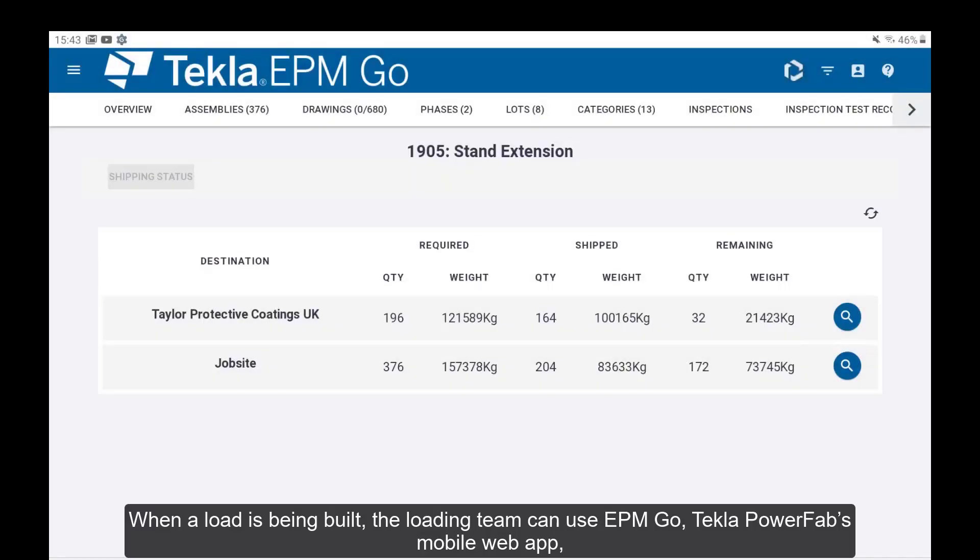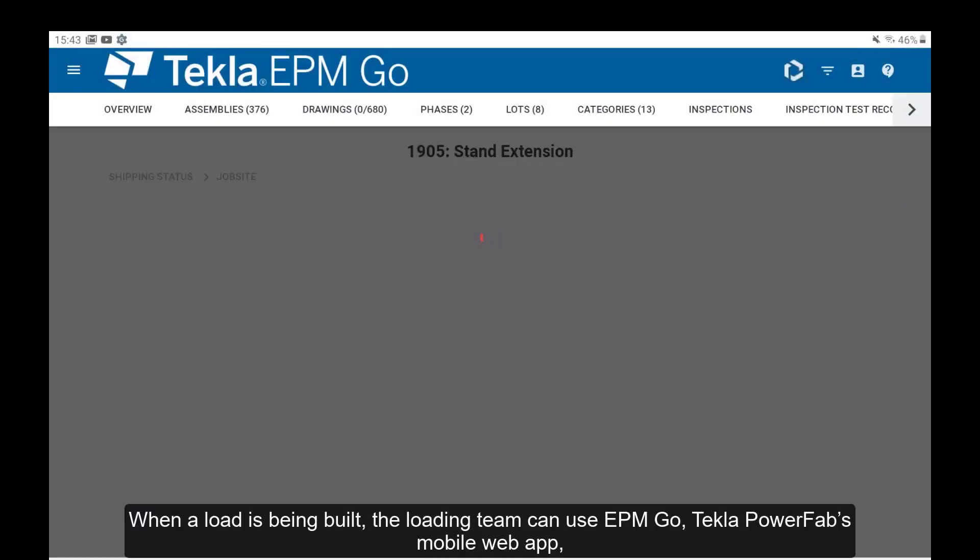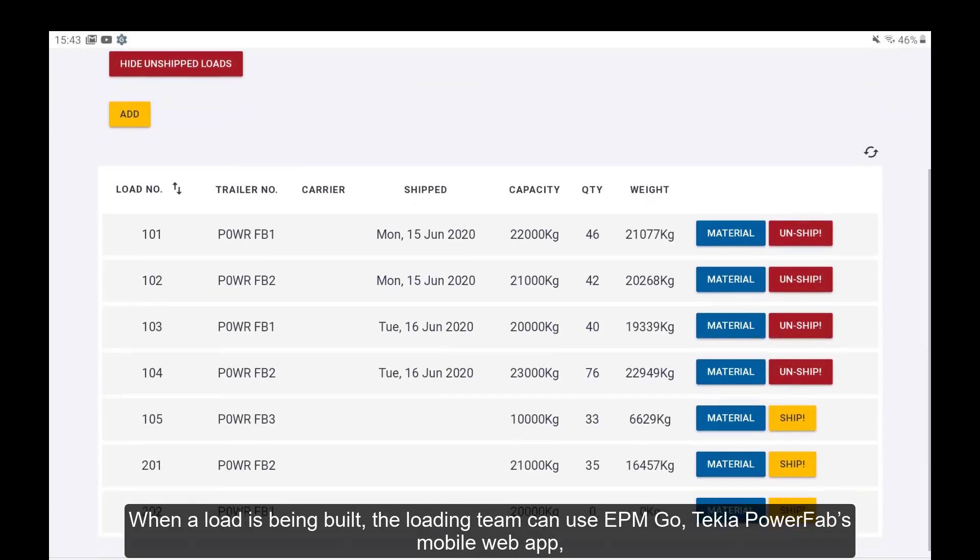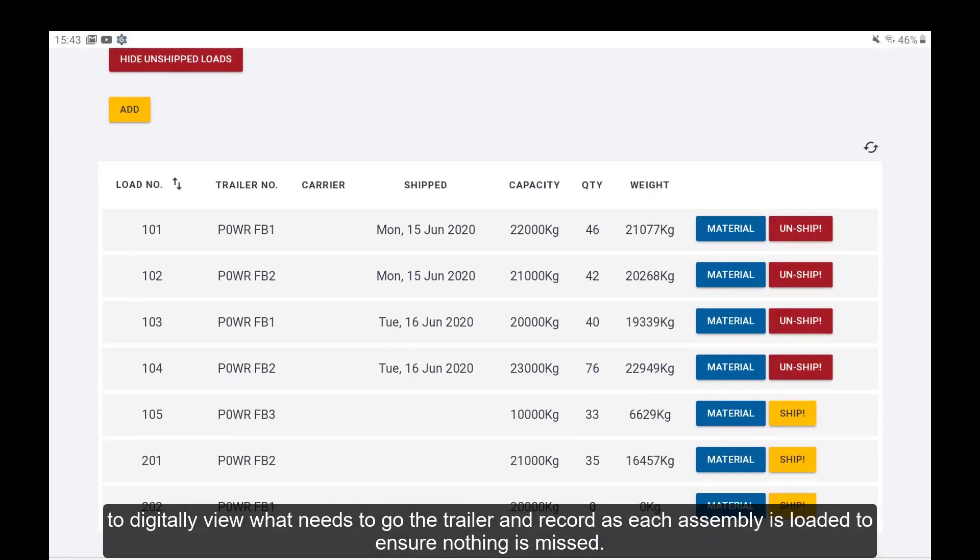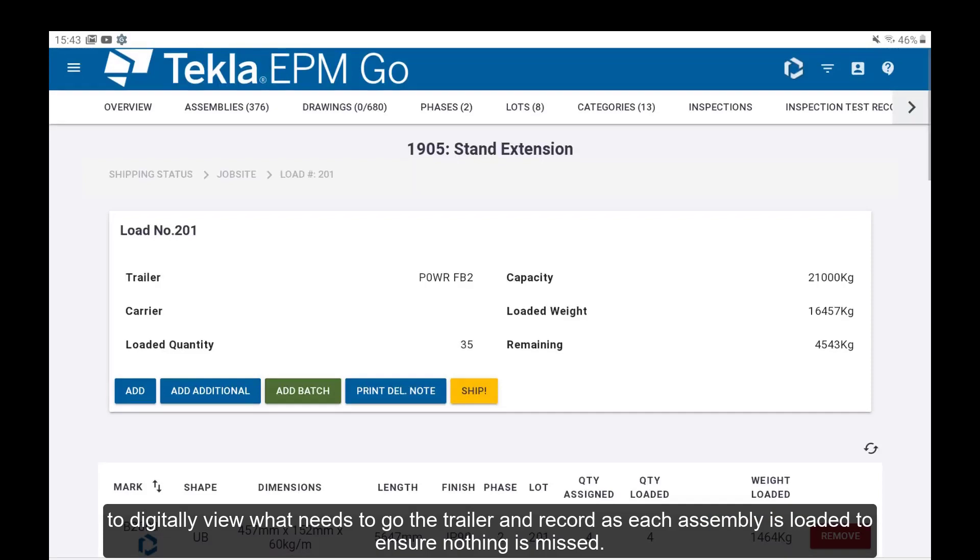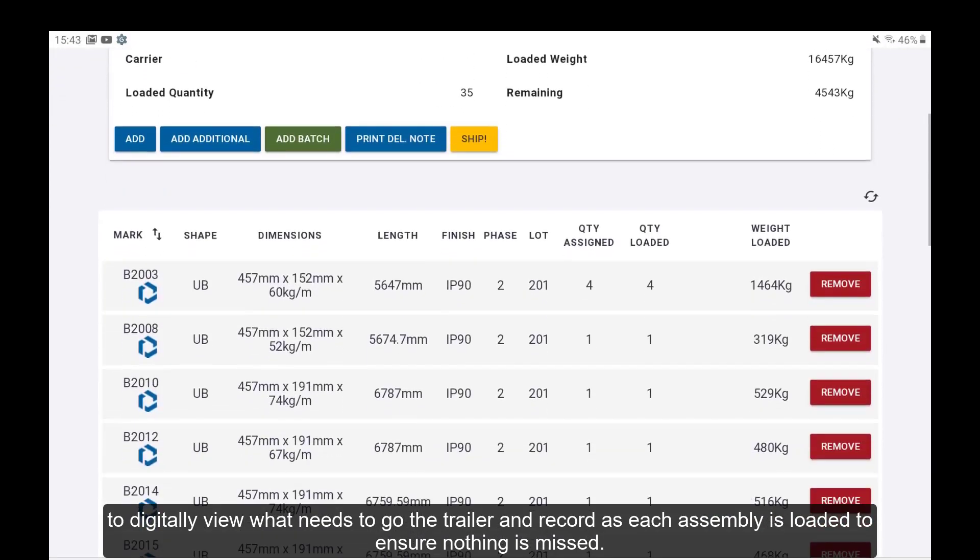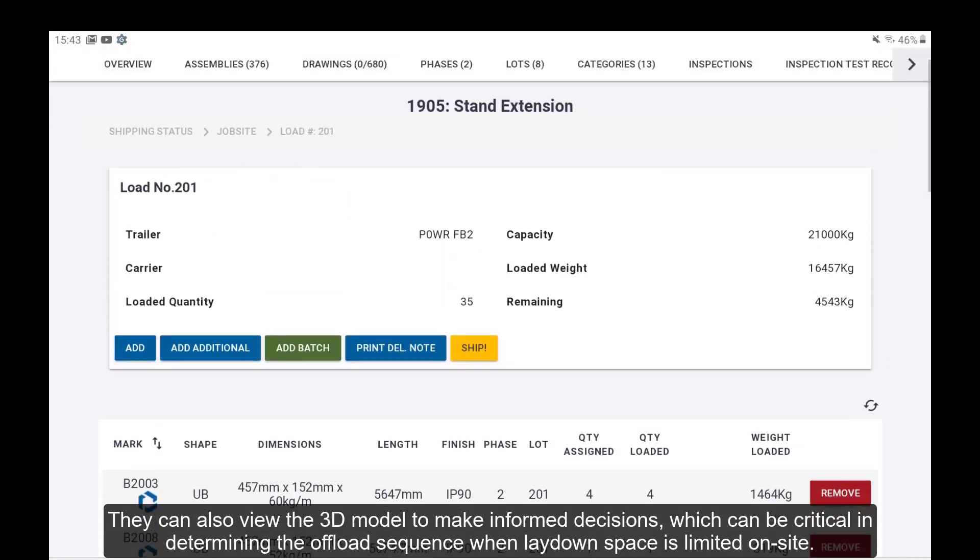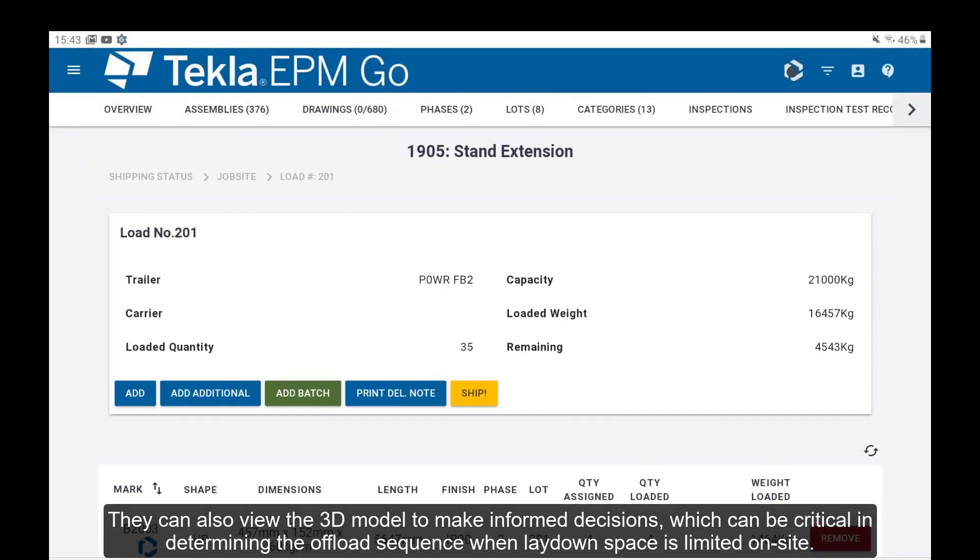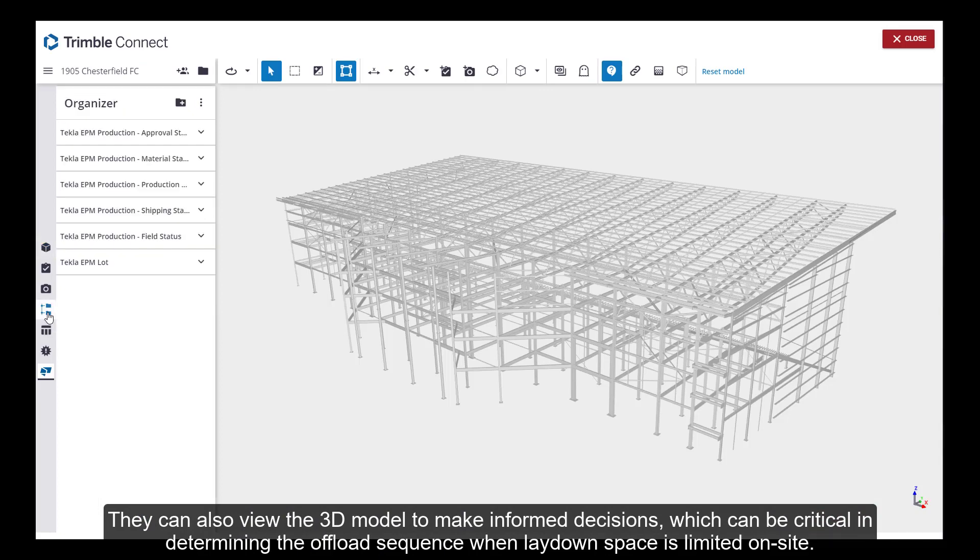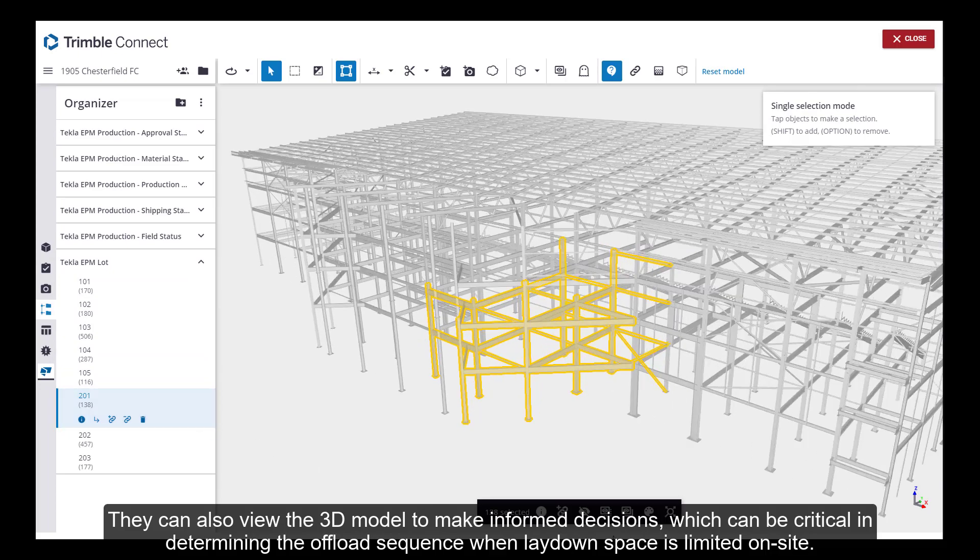When a load is being built, the loading team can use EPM Go, Tekla PowerFab's mobile web app, to digitally view what needs to go on the trailer and record as each assembly is loaded to ensure nothing is missed. They can also view the 3D model to make informed decisions, which can be critical in determining the offload sequence when lay-down space is limited on-site.